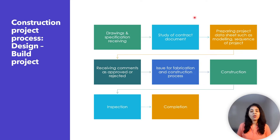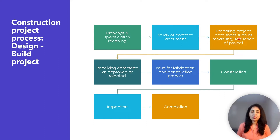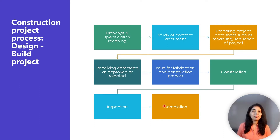The structural steel fabricator obtains a set of drawings and specifications pertaining to the portion of the project they are interested in. They study the contract documents and prepare their own project data sheet, such as the modeling sequence of the project. If more information is needed, they request it from the owner. The prepared data sheet is submitted to the owner and received comment as approved or rejected. After approval, it is issued for fabrication and construction. Actual construction then starts with inspection by the owner's representative and completion of the project.